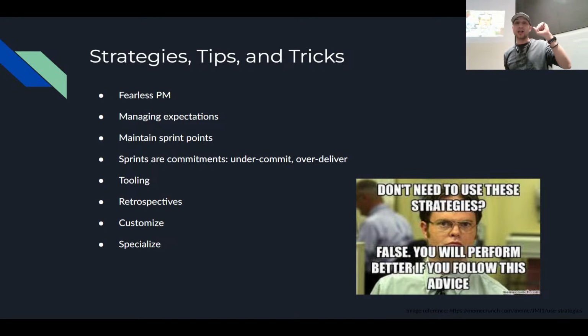And lastly, specialize. Because often, especially in Korea, you'll have someone who's doing product management, basically requirements engineering, prioritization, road mapping, and project management. What work is getting done over the next 2 weeks? Who's doing which work, right? If you have the same person doing these two things, it's a conflict of interest. Because a product person wants more features now, right? The project person wants more time and to get things done as quickly as possible. So the project person might skimp out on quality a bit in order to hit deadlines, right?